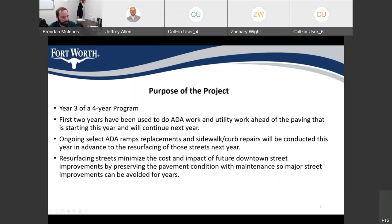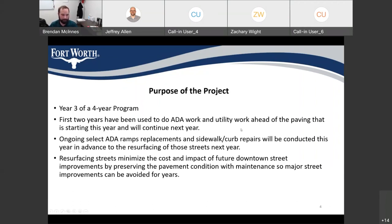The purpose of the project: this is Year 3 of a 4-year program. The City of Fort Worth, for the first two years, has been doing ADA work and utility work ahead of the paving that you'll be seeing starting this year and continuing into next year. This project will replace ongoing select ADA ramps and sidewalk and curb repairs this year, in advance of resurfacing those streets next year. Resurfacing the streets helps minimize the cost and impact of future downtown street improvements by preserving the pavement condition with maintenance, so major street improvements can be avoided for years.